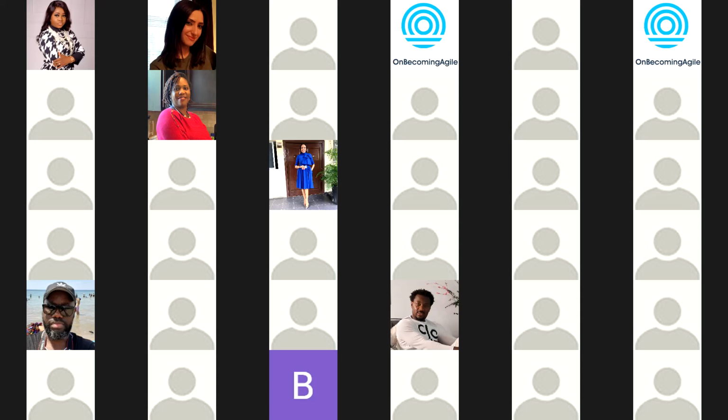And I gave an example. In this Azure DevOps example now, a feature could be, I want to build a mobile app, right? That is big. That's a big initiative, right? You can't build a mobile app with one user story. You need multiple user stories, right? Now, if you want to break it down, you want to build a mobile app. What type of mobile app? You want to build for iPhone users, you want to build for Android users. You cannot build a mobile app for iPhone users with one user story.